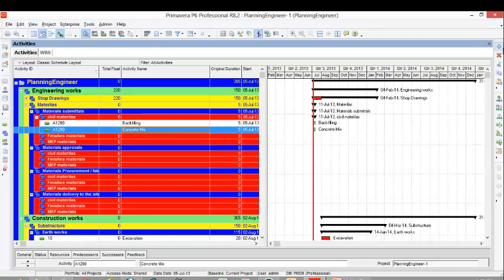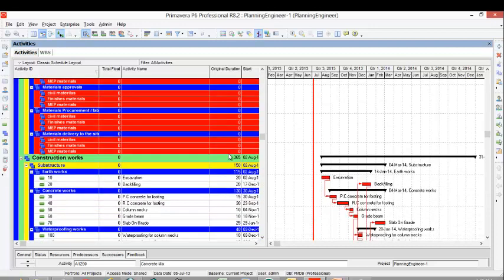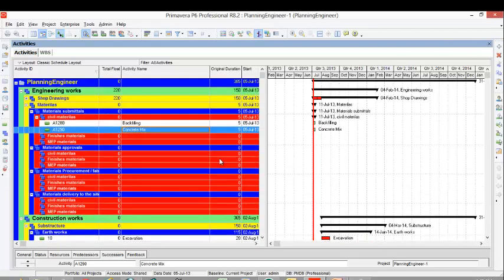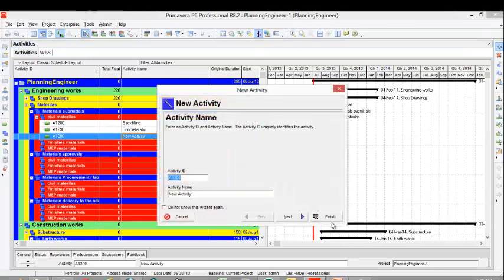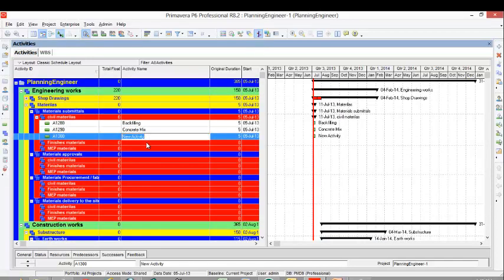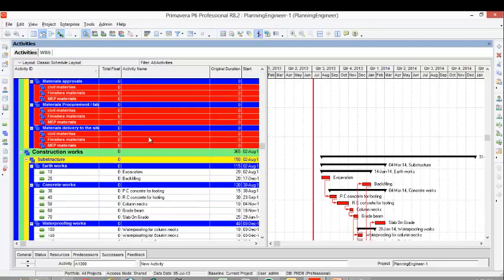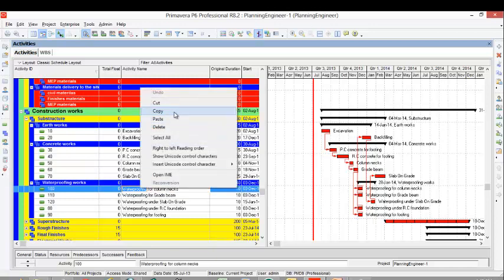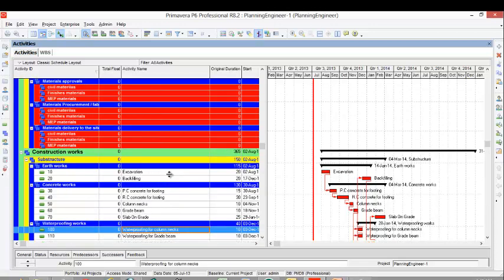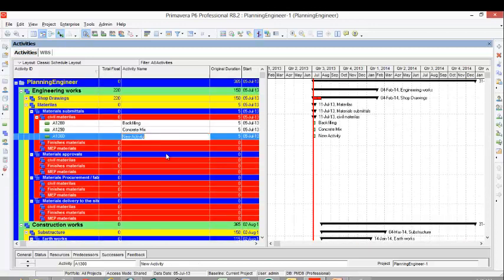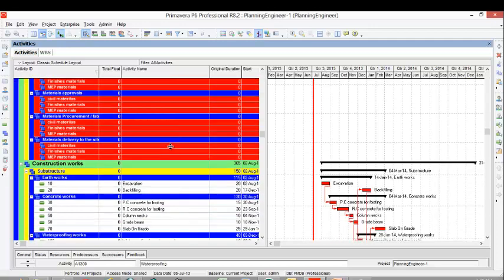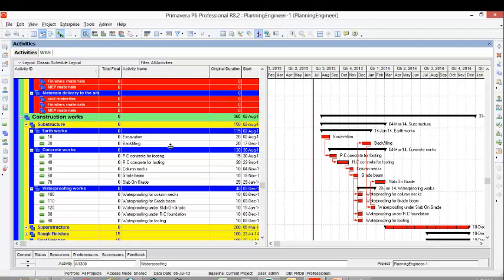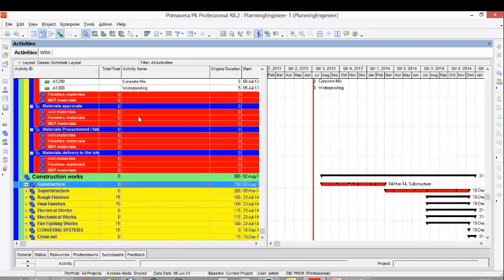We have here steel work. Reinforced steel is usually standard steel, so we're using just approved one. I don't think we should add it. We have the waterproofing. This waterproofing material should be submitted and approved. Then we finish the substructure.